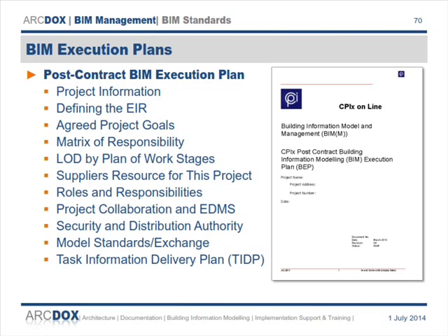It's great having the plan and having the model and having it all coordinated and everything worked out. But if you allow your guys on site just to go in the old way, first come first up, you'll end up with the same mess that you ended up with anyway. People have to understand that if they don't put it in accordance with the model, it's not going to work. You can't just say, well, I'm going to put it on that side because I always did. So it's got to be managed as well.